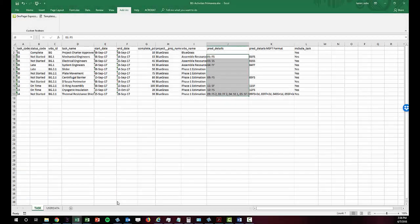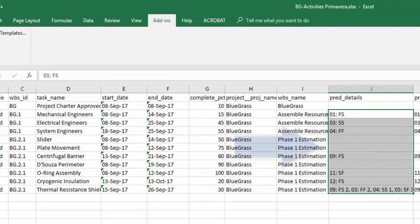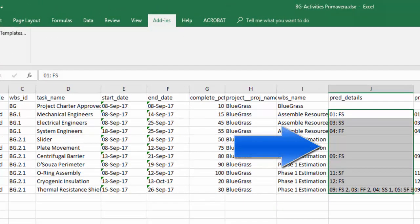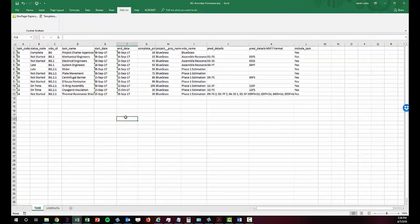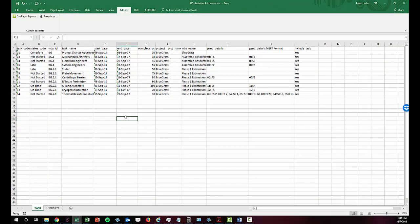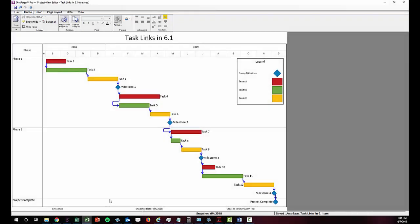For those that export from Primavera to Excel, OnePager can read the syntax of that dependency data in P6 format once it is in Excel to automatically generate links in OnePager.